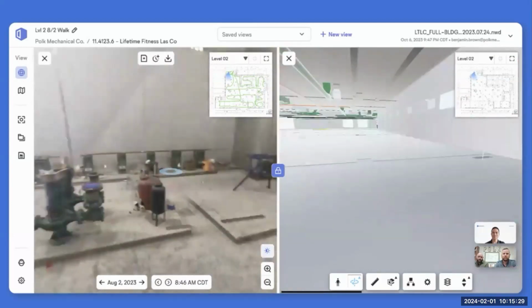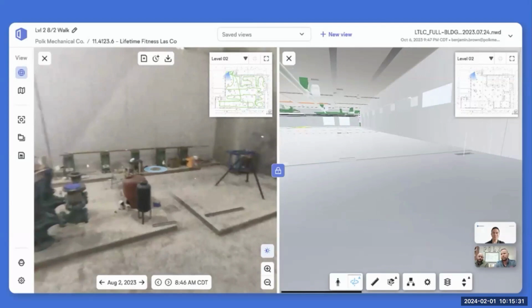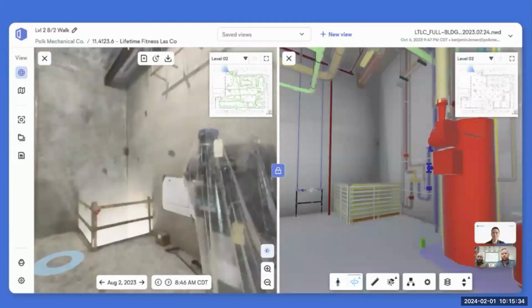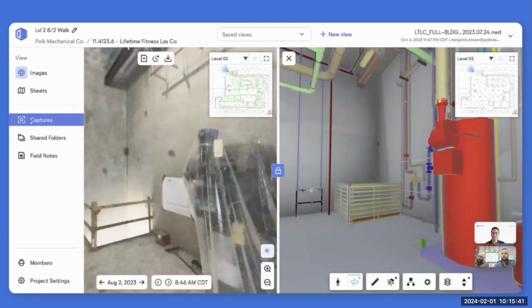Again, the progress is a big thing, validating progress against budgets. For an internal tool, that's a huge advantage to us. Being able to say, hey, we've installed, say we spent a certain amount of hours on this activity. At least that's what we've spent, right? Now, how do we validate against what we've installed? This gives me a quick way to view that and see if it is actually, say 60% spent and 60% installed, or we're say 60% spent and I see only 30% installed, right? Based on what's modeled compared to the actual view of the picture.